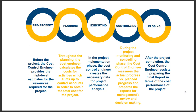In the planning stage, once the project is undertaken by the organization, the cost-control engineer calculates the cost for activities, which sum up to control accounts, in order to obtain the total cost for the project.